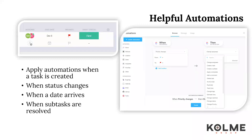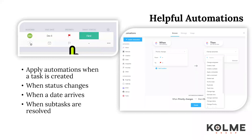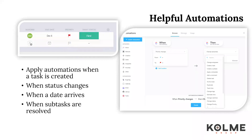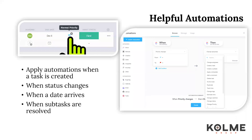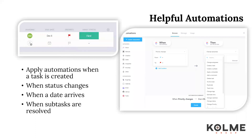Automations can take over repetitive tasks, saving you time. Some common automations when tasks are created are to apply templates, assign a team, member, or watcher, or add the task to another list. Automations can be triggered by status changes to assign a different team member or add additional subtasks. When all subtasks are resolved, automations can move the task to the next status. Automations can also be useful when a due date arrives to change the priority, assignee, or watcher.